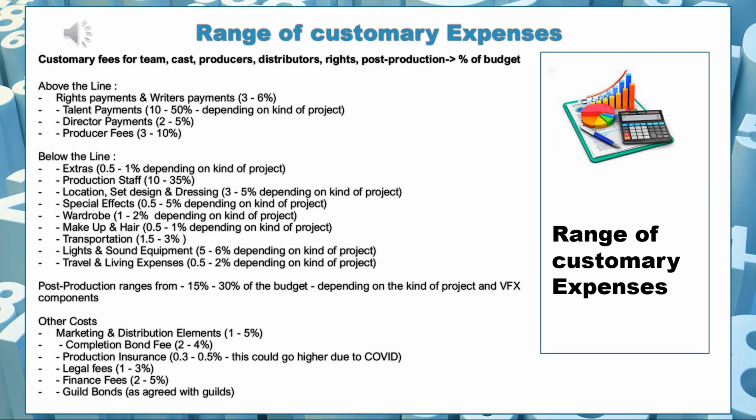This could be much higher right now due to COVID. I've seen COVID expenses for film and television shows increasing the budget by 10%. Legal fees, 1 to 3% of the budget. Finance fees, I've seen anywhere from 2 to 5%.